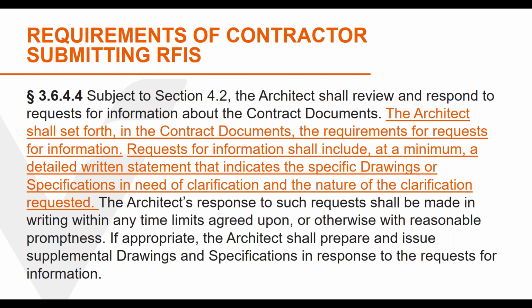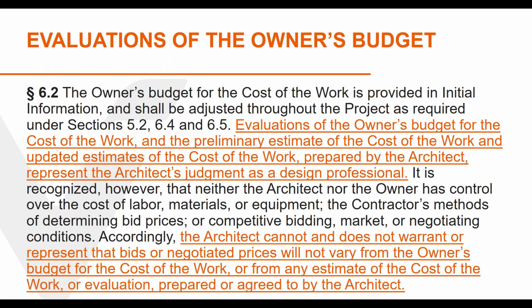There are, of course, times when the contractor does need additional information. So having in place a system that allows that but holds back the flood of unnecessary requests is critical to protect the firm from claim situations. Few clients think design firms actually understand the owner's concern over the cost of the work. Those owners should hire a separate cost estimating service that works with the design team through the design process. But when owners rely on the design team, there should be language such as this in the contract.